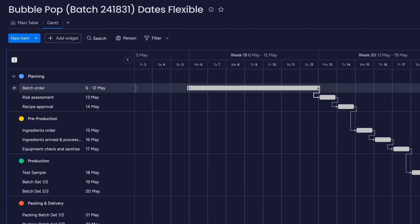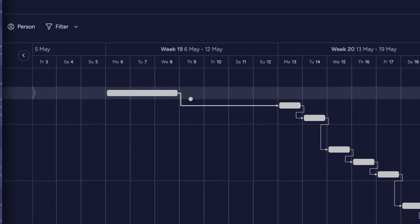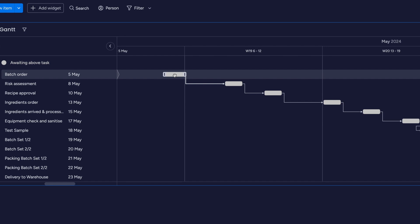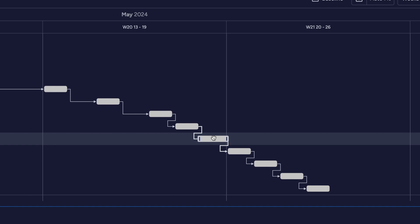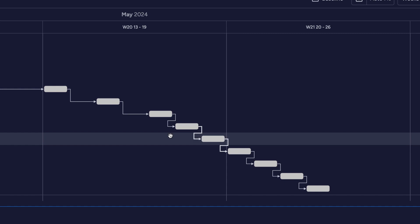However, if you move the parent item's date for approval forward again, it will leave the child's date where it was after it was adjusted. For Strict mode, Monday.com assumes that the exact time frame must be maintained. This means that if you must keep a five-day process between recipe approval and buying ingredients, moving the parent will maintain that five-day gap. This is great if you have a rigid structure of task timelines, as it will move all the dates any time the parent does, including any subsequent child item.